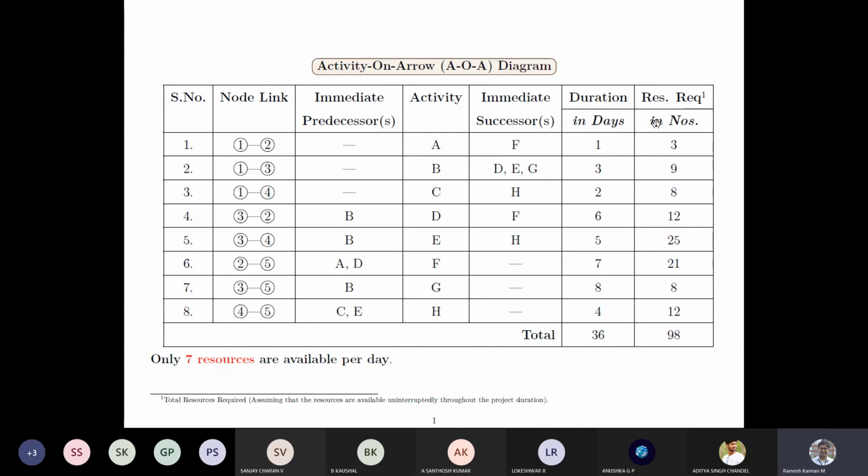So this is a little interesting thing. We have not done this earlier. This is the resources. Say for example, if this is an entire project of the carpentry work in a high-rise building, and each activity represents different floors, and carpenters required per activity is given as this column. So resources required, something like that. At this moment, we do not explicitly state what the resource is, but this is a numerical value, and this is associated with each activity, and it also has no dependence on the durations as well.